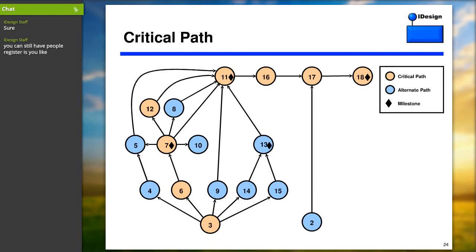And this is so important, I'll have to say it again. What I try to do is look for the longest possible path from the start to the end of the project. That longest path is called the critical path. It represents the quickest possible way this system can ever be built. This is actually the only way to answer how long will it take. There is no other way of answering how long it will take.